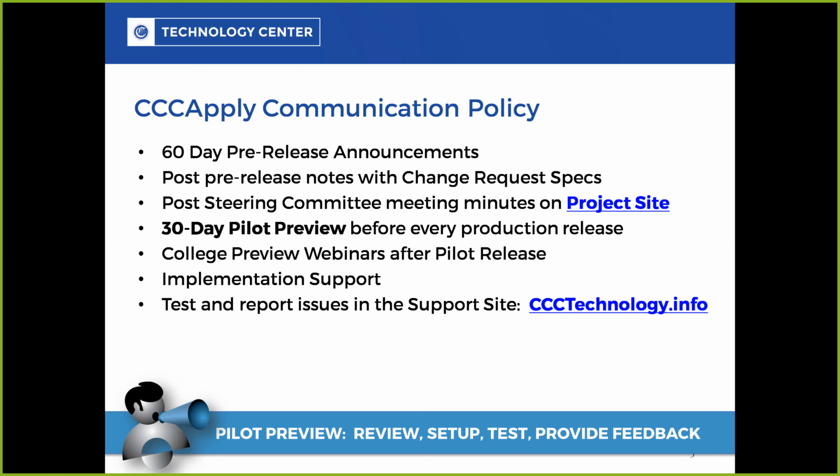And then we'll post the pre-release notes to let you know these are the change requests we've worked on, give you a chance to respond, post steering committee meetings. By the way, those are posted on the project site, which I have queued up and we can take a look at. And then 30 days before the release, we're gonna put all the changes in the pilot environment.